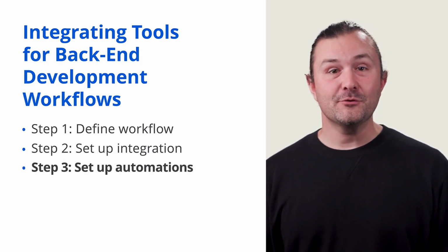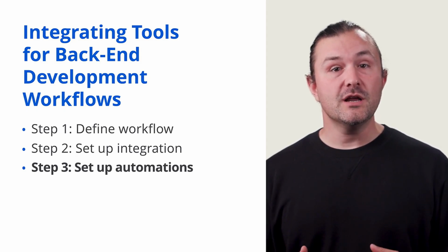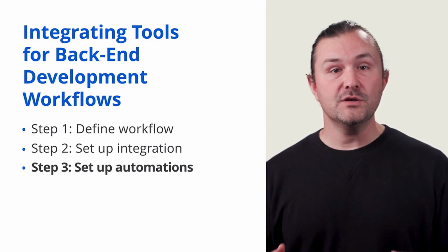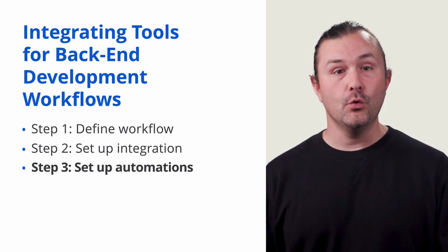The final step of integration is to set up the automations. Set up the integration automations so actions in the development tools like commits, pull requests, or successful builds automatically update tasks in the project planning tool.